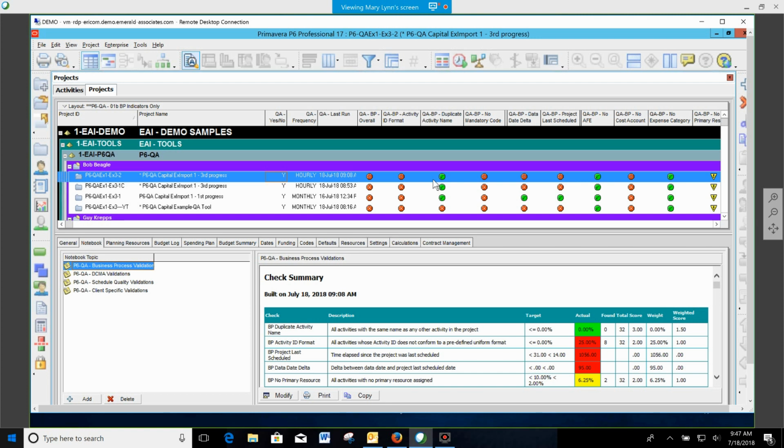Now, there is another one that generates a lot of problems on a lot of client sites I've seen. There's reports that are run at the corporate level. Now, to run those reports properly, you need specific codes assigned. Now, we can tell on our little example file here, we've got a real problem. We have not passed the evaluation for mandatory codes. So a couple of really quick, really good pieces of information here that tell us, yeah, before we kick this one into execution or carry on any farther, we definitely have some issues to deal with.